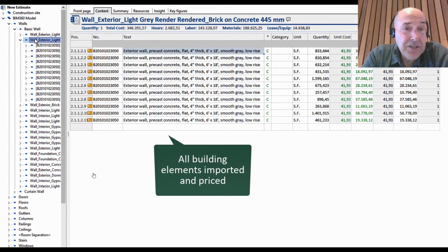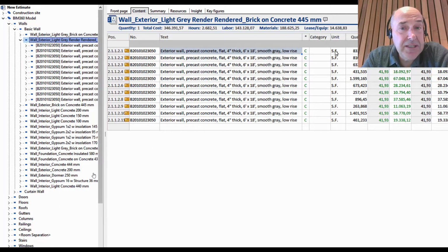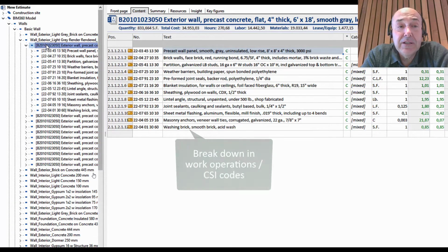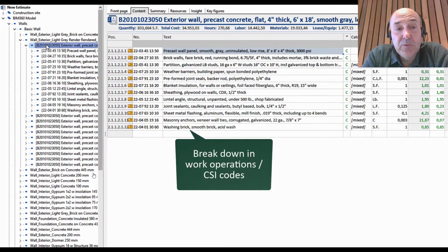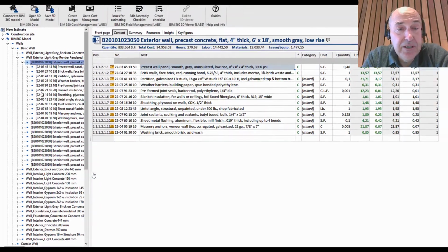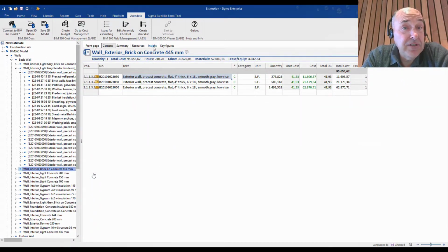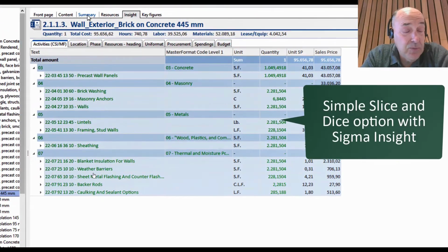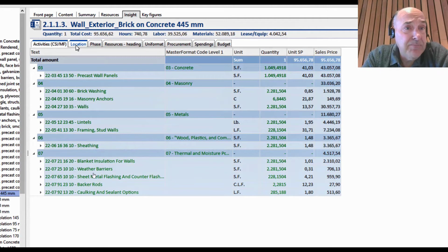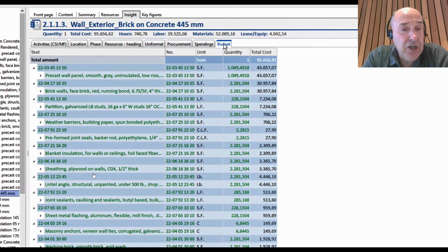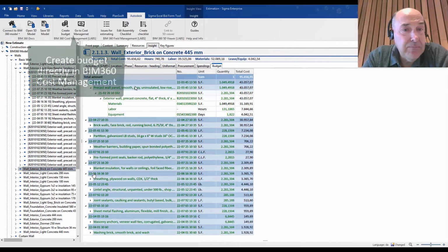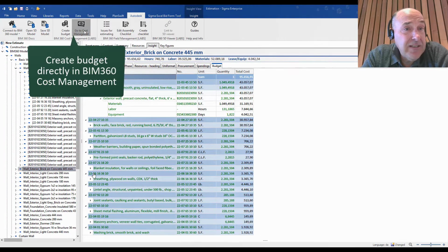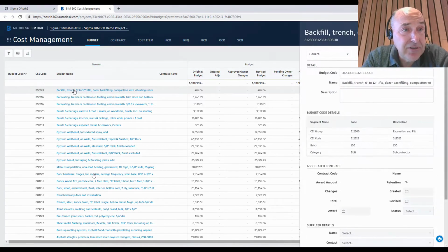And there's a lot of information in a building information model. I mean, people who do this kind of thing today, it's pretty intimidating doing a cost estimate of a large project and getting really granular detail, which will be very important later as one keeps track of how real costs are matching up with the cost estimate. And the sooner, the easier it is to see any disconnects between the estimate and real cost, the more time one has to address it. Whether that's doing some cost-based re-engineering, or spending a bit more time working with suppliers and subcontractors.